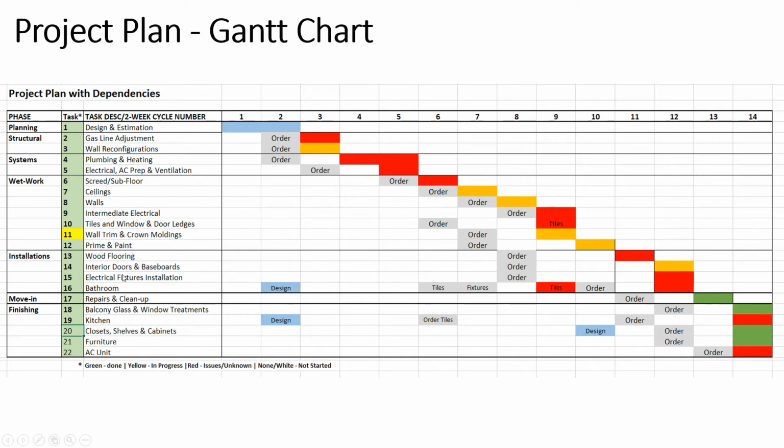And if I would have scheduled it in here and held up something else, it would have delayed my move in. So it's better to do this post move in, rough in all the fittings or place you can, the drywalling and everything, rough that in, and then just plan it out to be done later in the project. I mean, ideally you could do it here after the floors go in, and before the interior doors and the baseboards. You could do it there, but it's a better idea to wait a little bit in the reality we're living in.